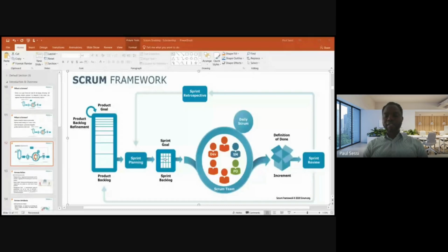So if you guys decide that the sprint is going to last for 2 weeks, within those 2 weeks, every day you're asking them questions: What did you do yesterday? What are you doing today? And do you have any impediments or challenges that I can help you solve? So that's what the Scrum Master is doing, right? So they will tell you if they have any challenges. If they do, then you have to resolve it for them.